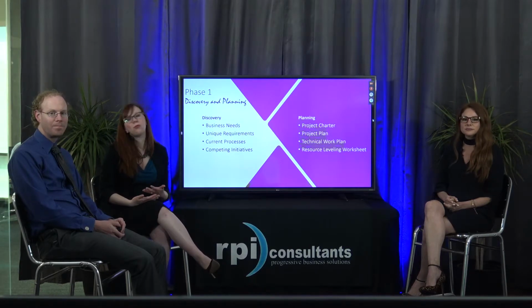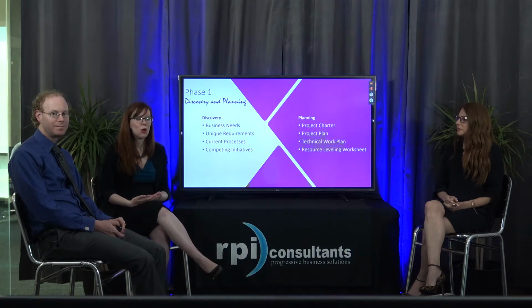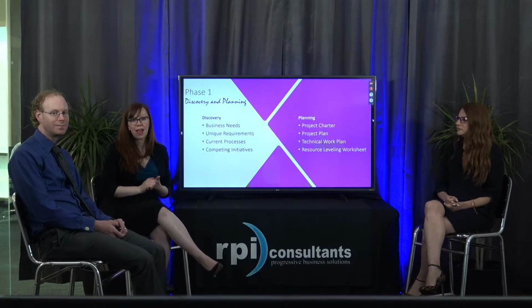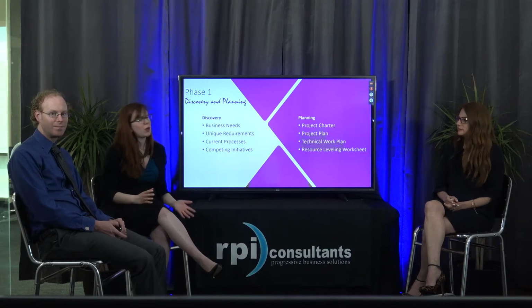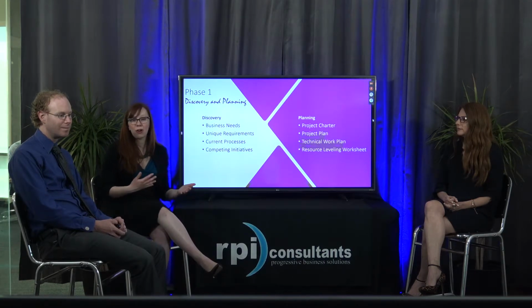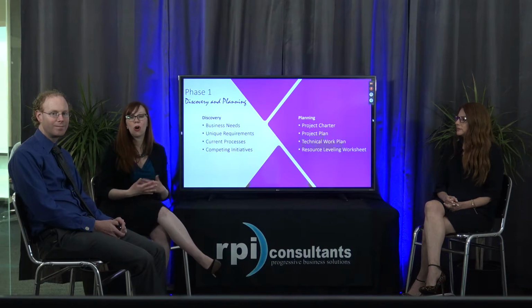And also a really, really important deliverable that comes out of this phase is the technical work plan. This is where we sit down with the technical team and look at your reports, your customizations, any sort of interfaces, and also the conversions, and really in detail plan out how much work is this, who is able to do it, and we can even take a point there to step back and say, is more training needed for the technical team? Do we need to build in time for additional training on site, or are you able to pick it up on your own or go to Infor? Those are all the kind of considerations that go into that technical work plan.